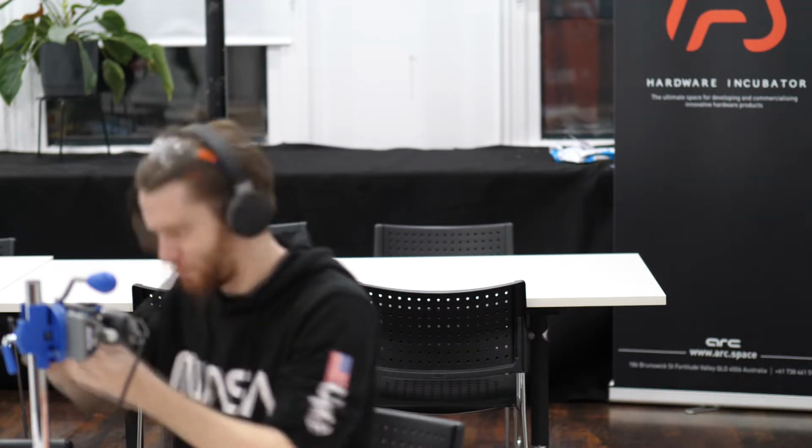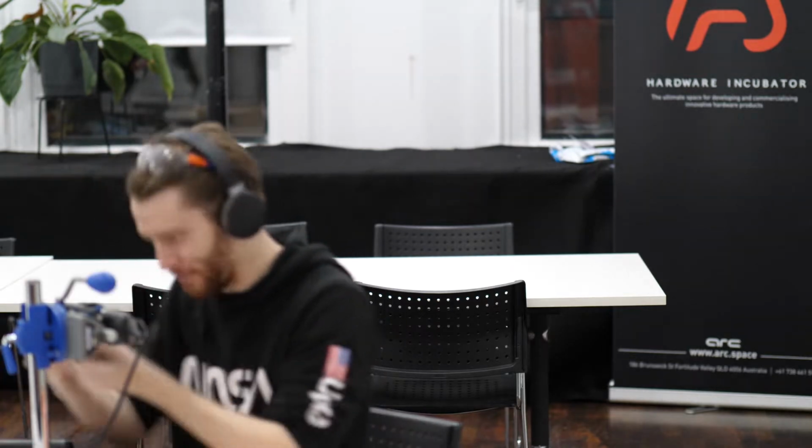And that brings me to a little bit of a downfall. We've been contacted by the touchscreen manufacturers. They're going to take longer than expected. They've improved their production capabilities and their production process, I should say, and they have quoted us a longer lead time than we were expecting. Previously, the touchscreens we've got from them have come within a month. But this latest batch, they've quoted me 8 to 10 weeks, which means about mid to late November on arrival.